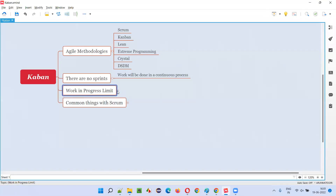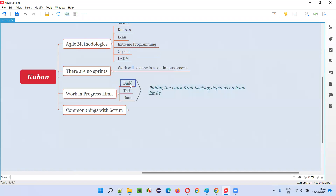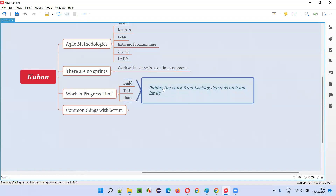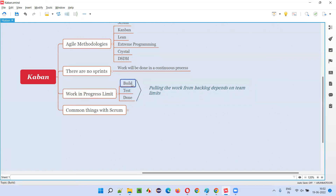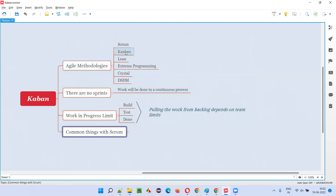Work-in-progress limits apply whether it's in development, testing, or done state. Pulling work from the backlog depends on team limits — how many developers and testers there are. Based on that, developer limit and test limit are set. The Kanban way of developing and testing software is different from the Scrum way.